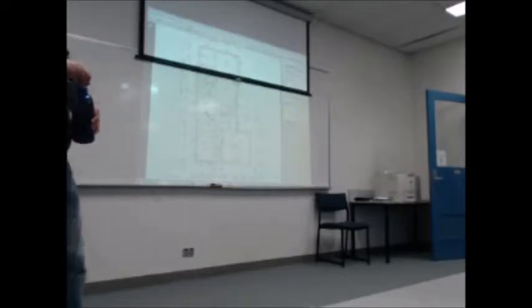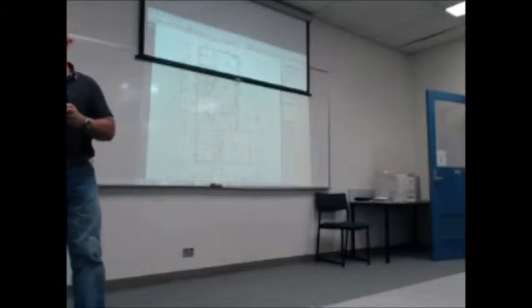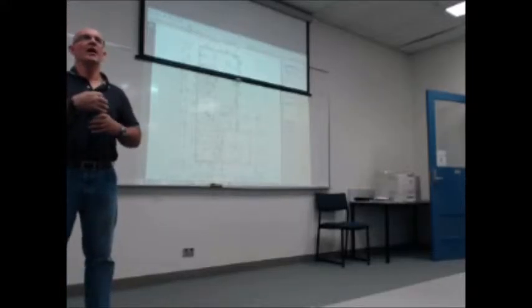What's it got as a price for? 32. Tyler has to do a bathroom, which is up the walls, all the cuts around the sink, whatever. That's a bit more time consuming. Is he charging more per meter than he usually does? Usually there are two rates, one for floor, one for walls. Yeah. Shower basin is another rate. Quarters are another one.